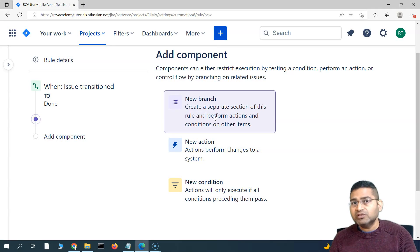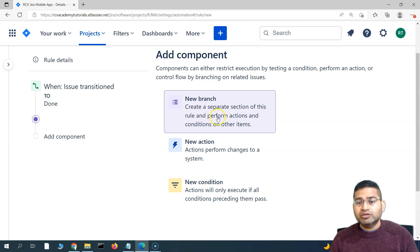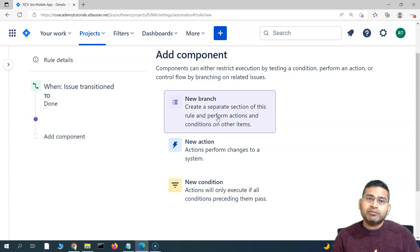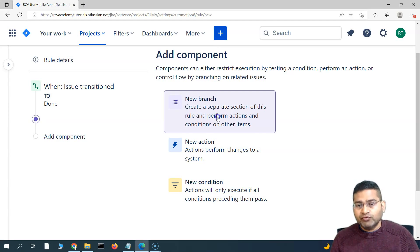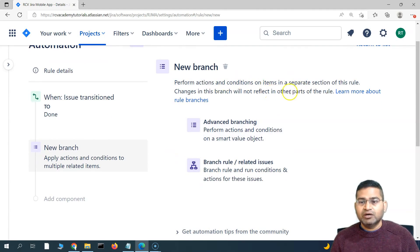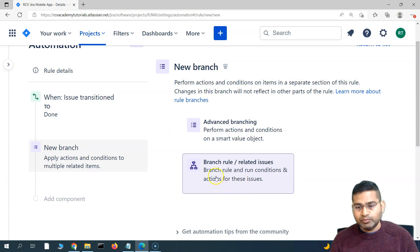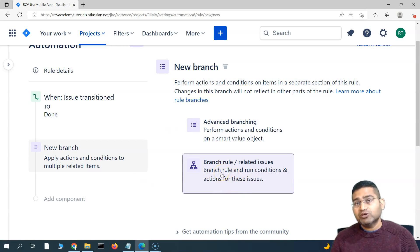Now there is a fourth component — the New Branch. Branch rules are for handling issues that are not in isolation. In Jira, issues are linked together: issues linked to an epic, subtasks linked to stories. If you want to perform actions and conditions on a separate set of related issues, this is what New Branch does — it performs actions and conditions on items in a separate section of the rule.